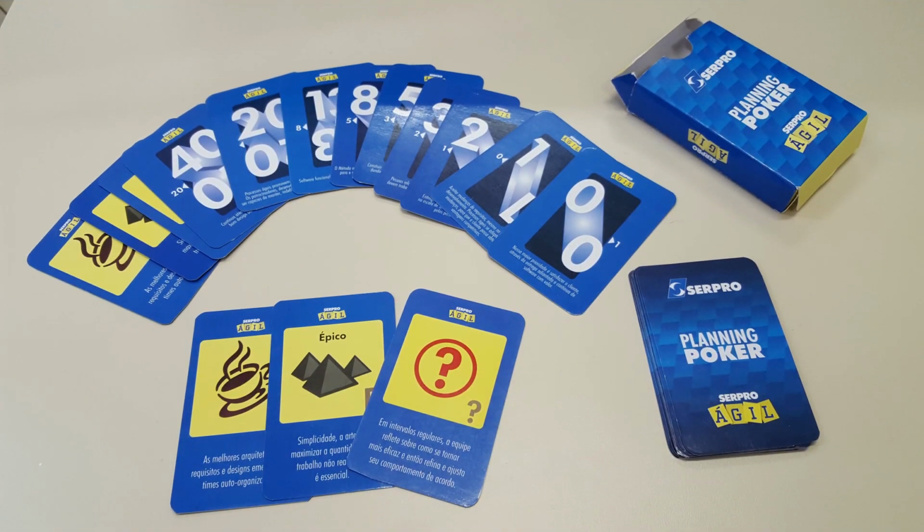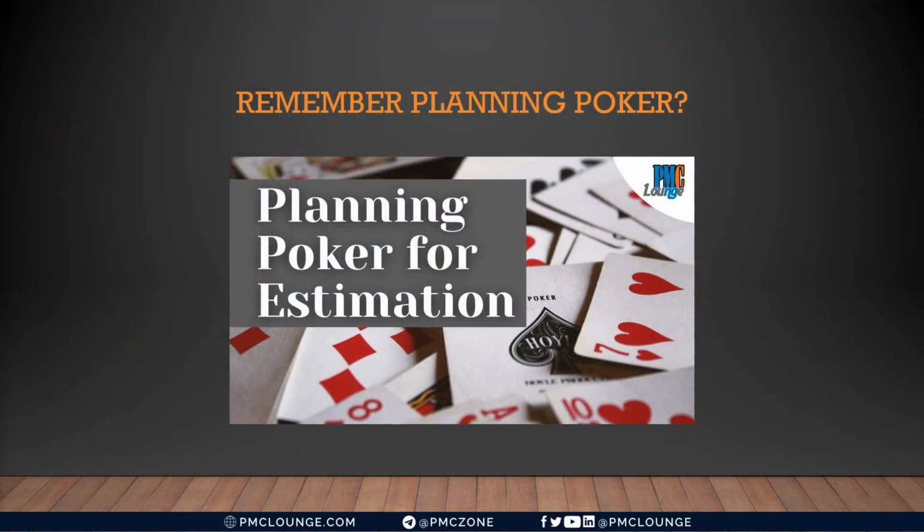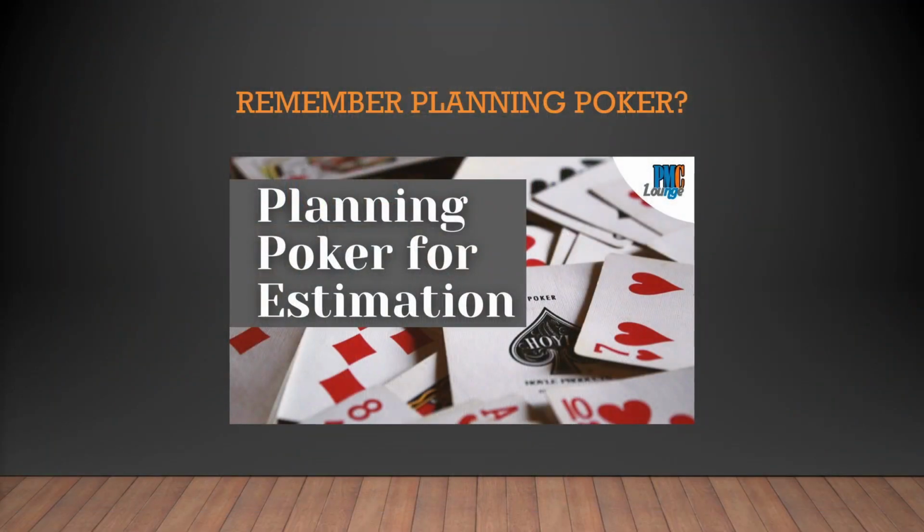There is a Scrum master who is hosting this entire event of planning poker, and the Scrum master, he or she has given a deck of cards that contain numbers, and these numbers are estimates for each of the stories. So the team is now going over the sprint backlog in the order of priority, and the team members are assigning a value from that deck of cards to each of the stories.